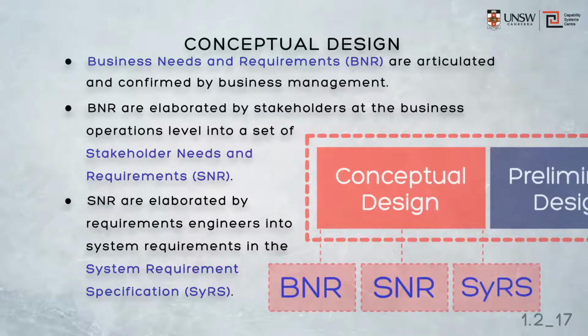There may be more than one system requirement specification for the entire capability system, but it's more likely that there's one SYRS for all of the constituent elements of the capability. That is, one for each of the major materials system, one for the personnel, one for support, one for training, facilities, and so on. As noted earlier, each of these constituent capability elements may be developed independently and may well be developed through separate contracts.